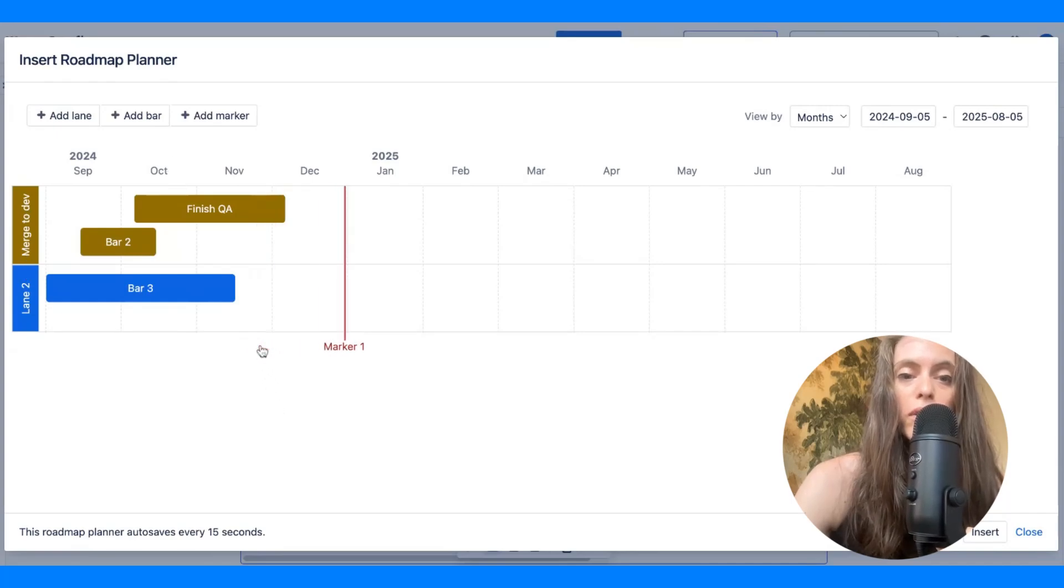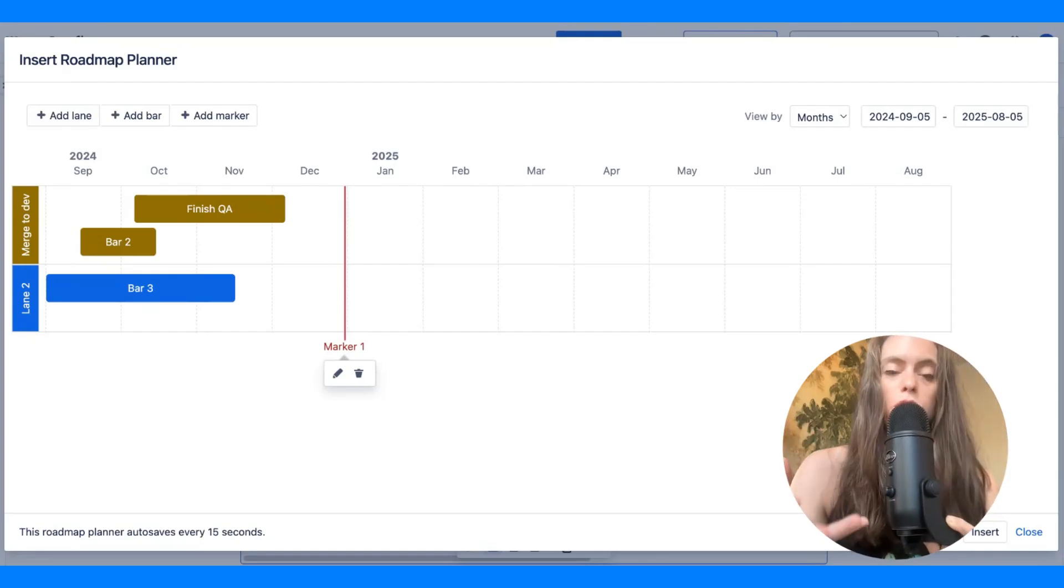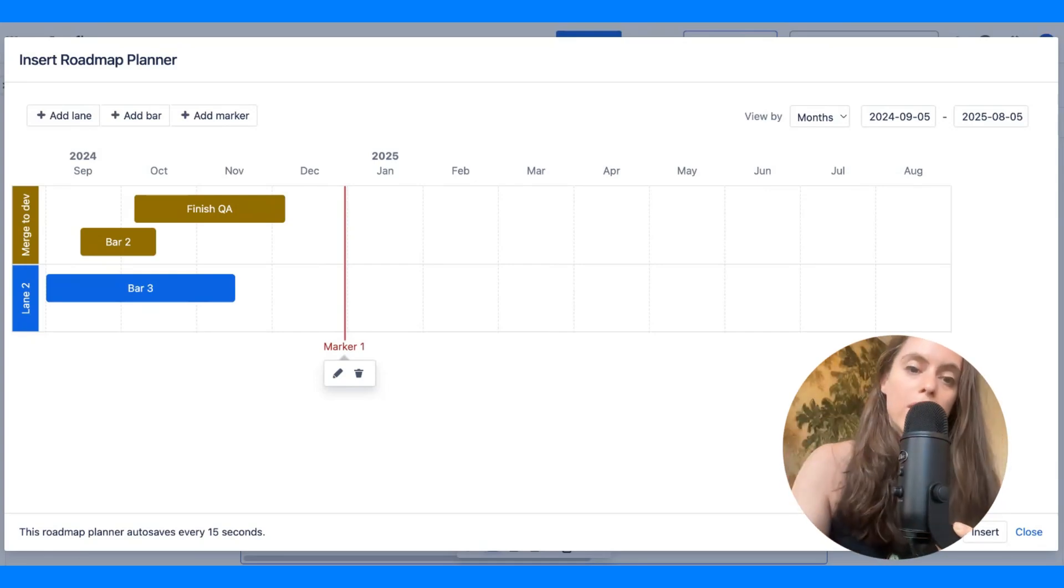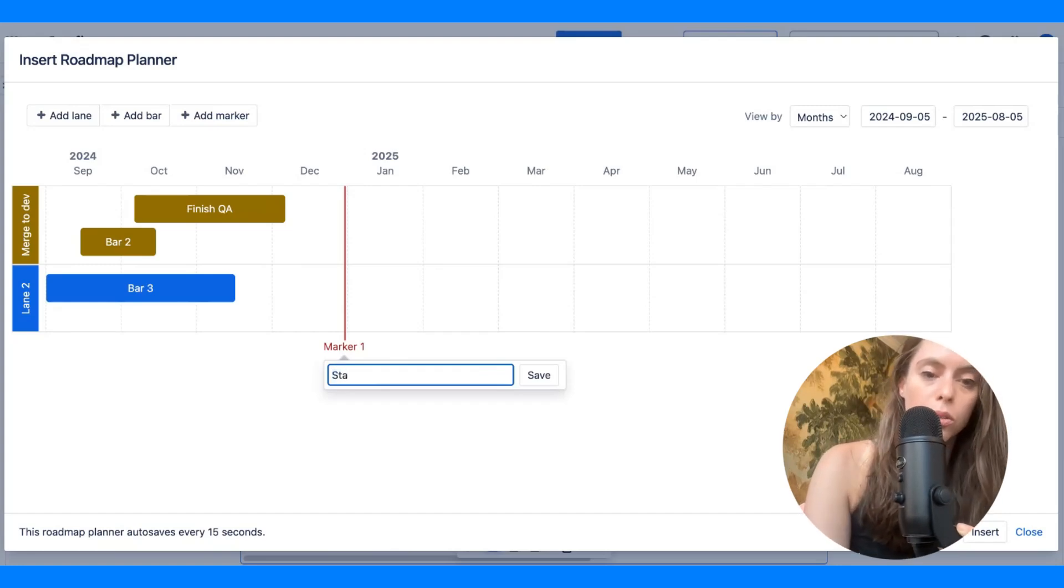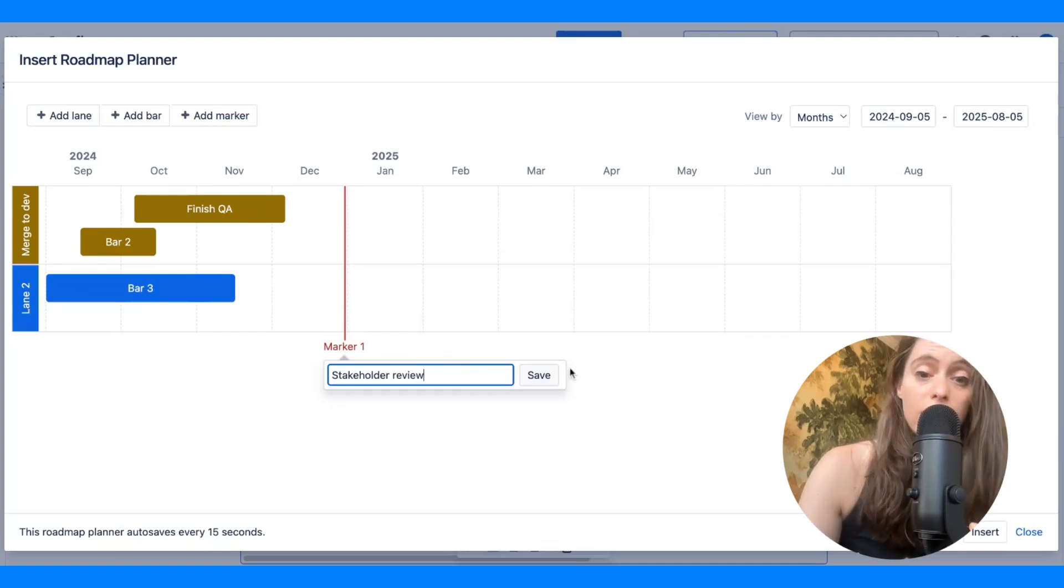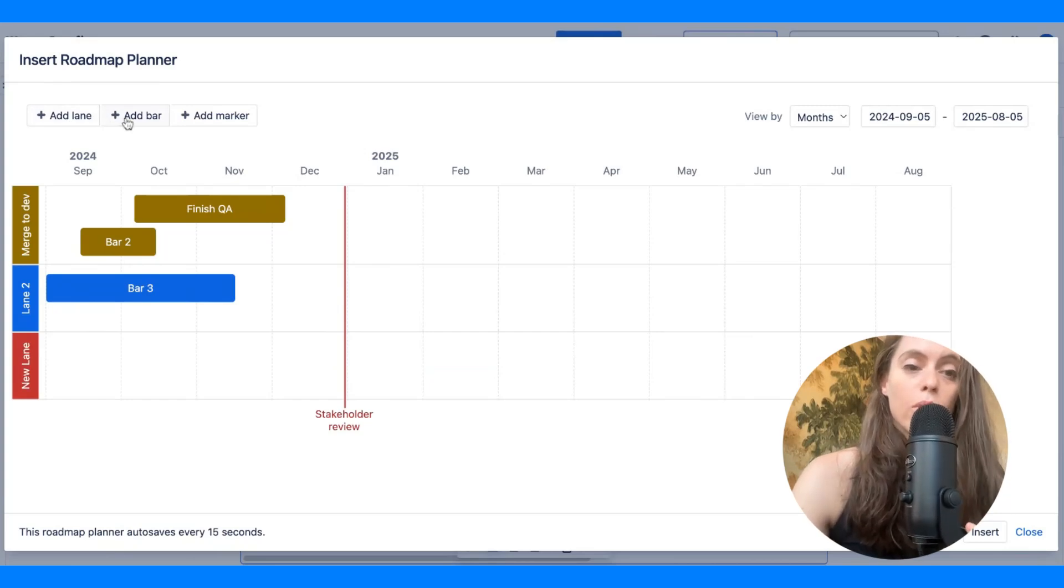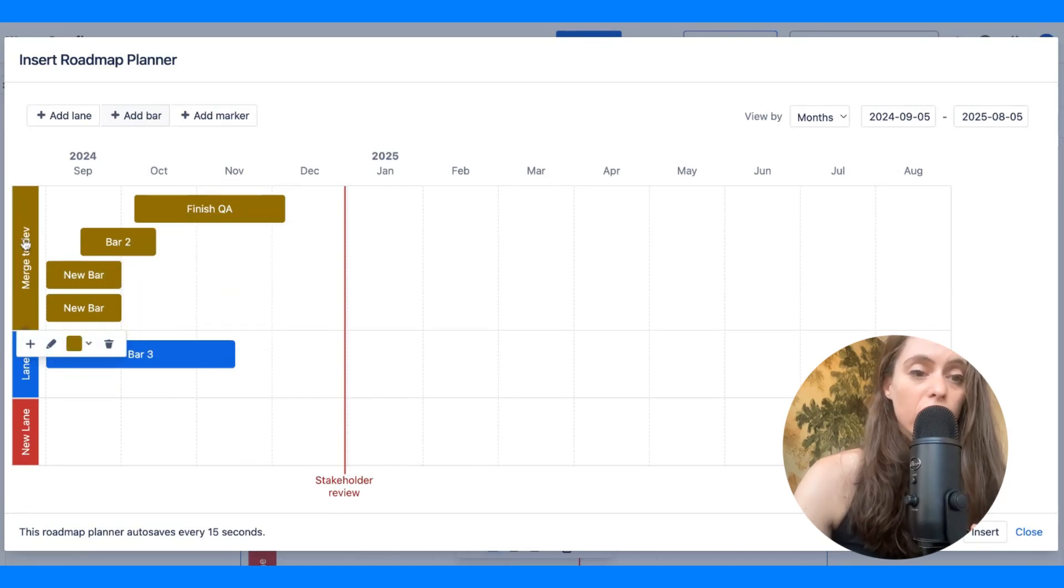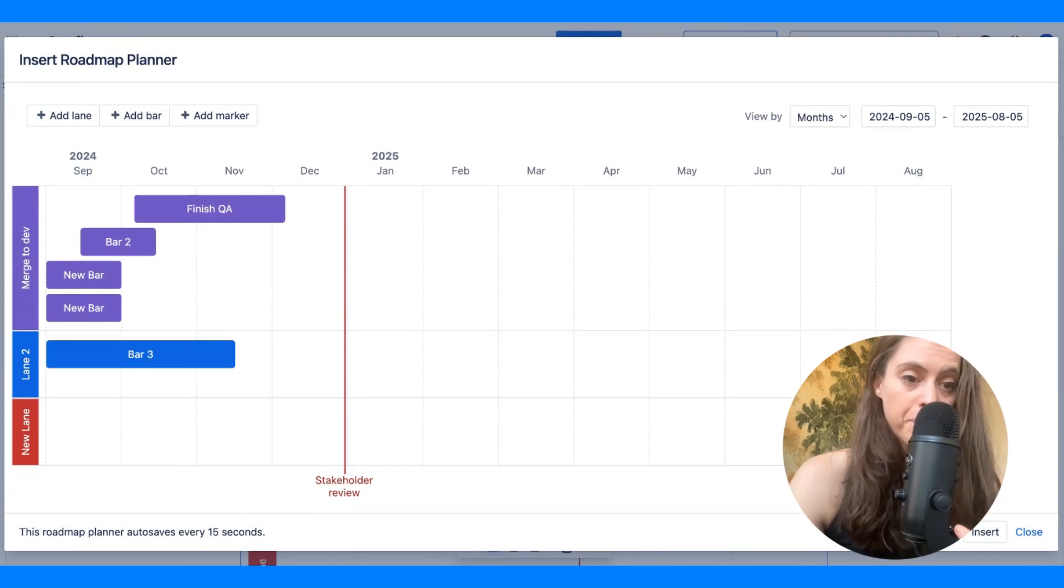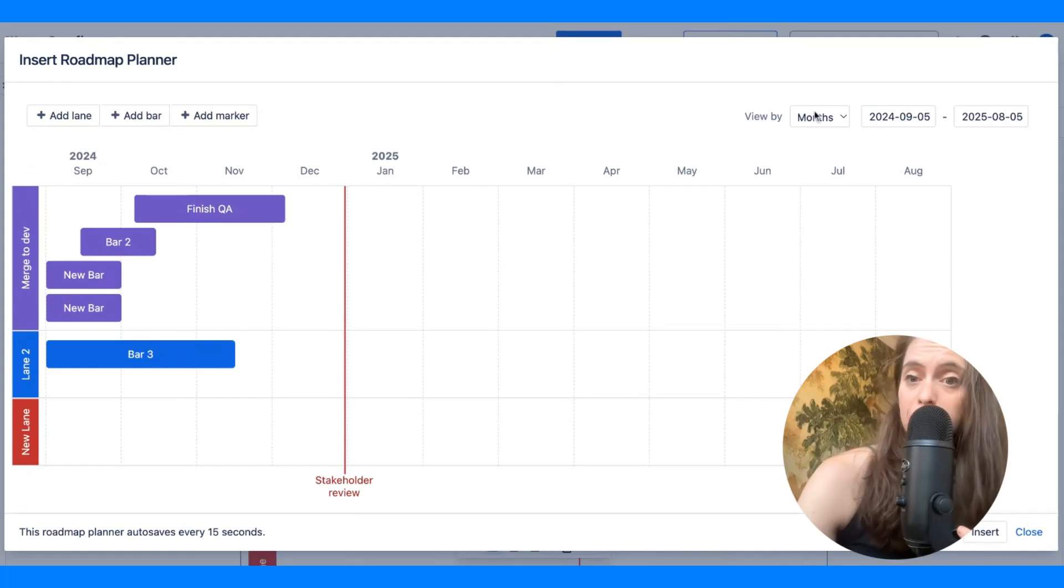Now, these markers over here, while JIRA doesn't have the idea or the notion of milestones, these markers, though, can be used as such. So, let's say stakeholder review, and this is when the stakeholders you have agreed would need to look at whatever it is that needs to be looked at. So, you can add lanes, it will automatically make it a new color, you can add a bar to whatever lane you're currently in, and you can also, I'm not a huge fan of this color schema that is going on, you have some basic color choices that you can choose from.